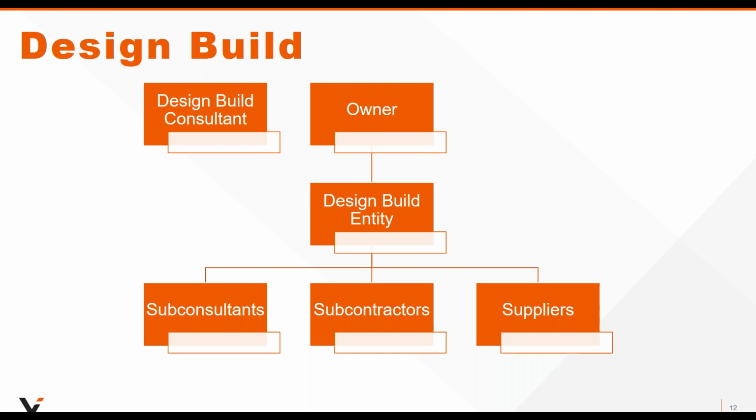Oftentimes, they will engage, prior to that process, a design build consultant who will provide the design build entity with some upfront information about what is required. Where's the facility? What are the capacity requirements? Where's the site? Any number of things that relate to the project that is prepared by that design build consultant, who operates outside of the design build entities, providing services to the owner.